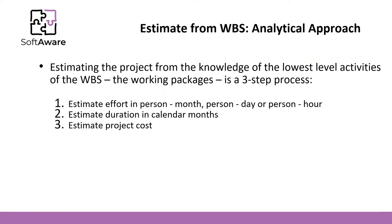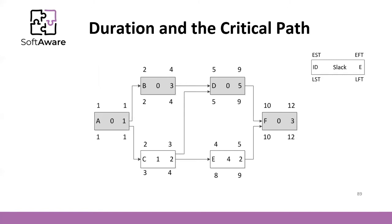Just to remember: effort is the time that you will spend to do a task, and duration is in calendar months. If you take two hours to do a task and you just have one hour per week, then your effort will be two hours but your duration will be two weeks. Cost is calculated from the effort, not from duration. From the duration we calculate the critical path and the duration of the project.